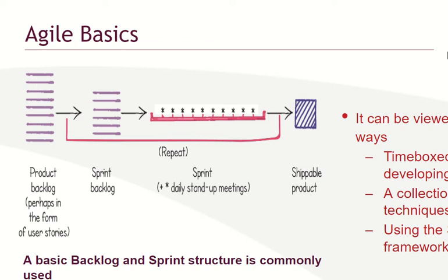So Epic is broken down into user stories. Epic is like, I want to build a two-bedroom flat. Okay, what are the things you want to have inside, the features? Those are the user stories. So all the things you want to have are put together in a document, referred to as a product backlog.